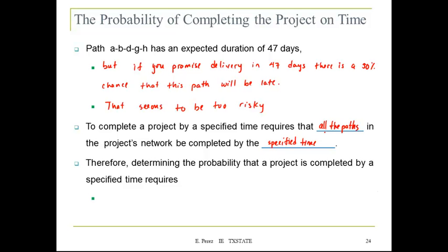So therefore, determining the probability that a project is completed by a specified time requires calculating the probability that all paths are finished by the specified time.